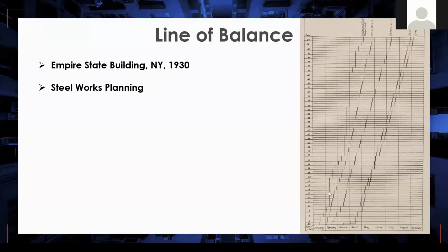And we have these lines, which determine the line of balance. We are able to track and see all the project schedule within a single view. Here we have 5 activities: the orders, details, delivery, and execution. From the first insight, what we can understand is that these 2 activities, delivery and execution, are following a really tight schedule.